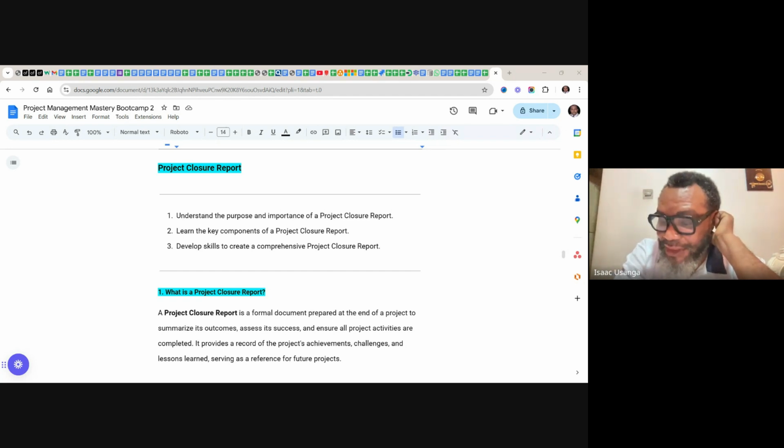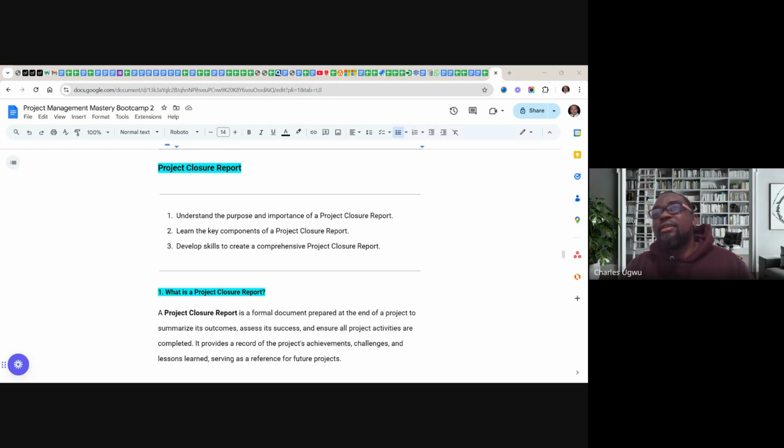When you talk about expected success factors, is it the same thing as definition of done? Yeah, definition of done is used in agile environments, and it's the same thing as success factor. Definition of done means that when we finish a deliverable, we must agree that it's done before we can click done, or before we can tick the checkbox that this is done.